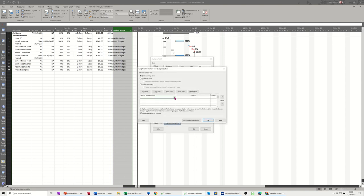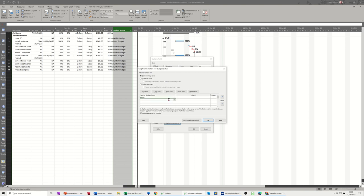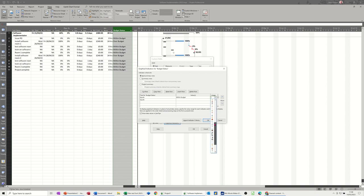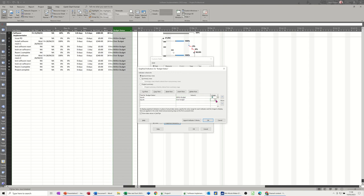And then basically I need to change both of these options to equals. And then very carefully, you have to type exactly the same as you typed in the if statement. So if it's within budget, if you do a typo there or a space or anything, you will get an error message. If that's within budget, I can have a green smiley face right down the bottom.